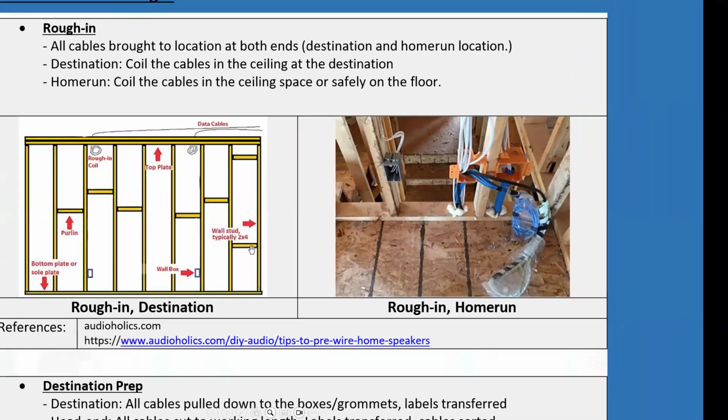And also, if you have clear stages established, then it helps with the billing process. Try to avoid a lump sum after the whole job is done, because you never know how long this job is going to take, how long you're going to have to wait for the other trades to be ready.